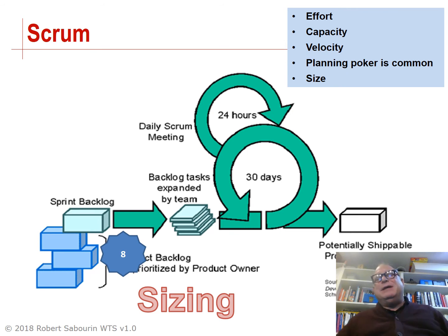Teams estimate the effort required to implement a feature, a story, a backlog entry by doing what's called sizing. Sizing is sometimes done in the very same meeting that grooming is done, or it could be a different meeting or different session. The team knows what the story is. They know what the acceptance criteria is. They've related the story to their past shared experience, so they can basically estimate the effort required to implement the story. A team basically knows what their capacity is.